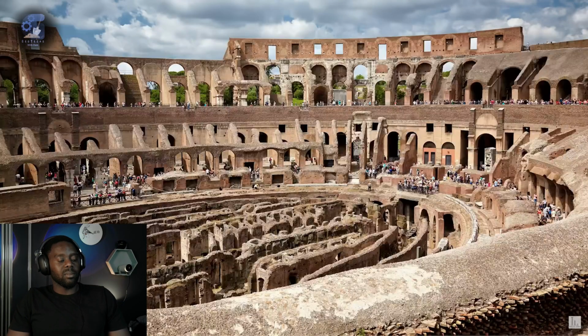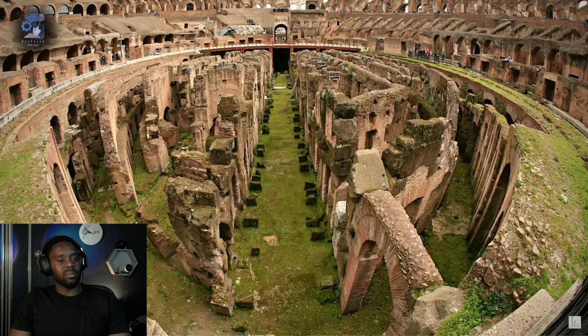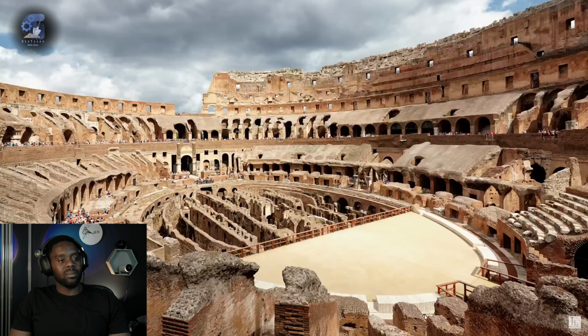If I did the math right, something like 70,000 man-days of labor would have been required to excavate and haul away 170,000 cubic meters of rocky soil. But this does not account for the fact that the workmen had to cut into bedrock on the north side of the foundation trench and had to contend with the high water table throughout. So let's say, conservatively, that 125,000 man-days of labor were required. I'll assume that the workmen earned an average of 4 sestertii a day, which seems to have been the going rate for a laborer in first century Rome.